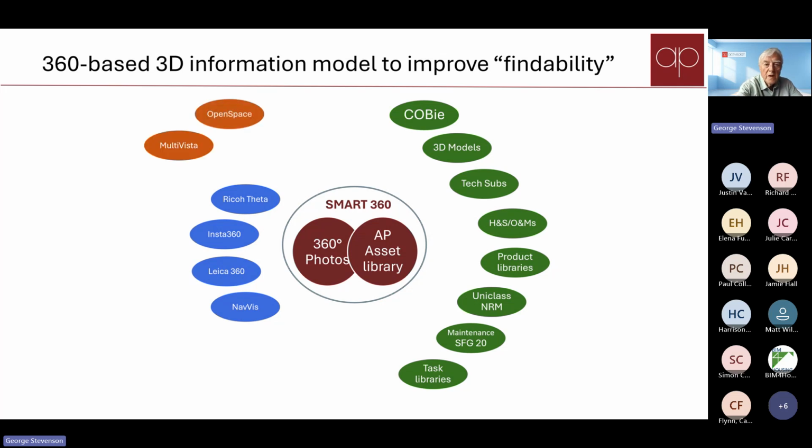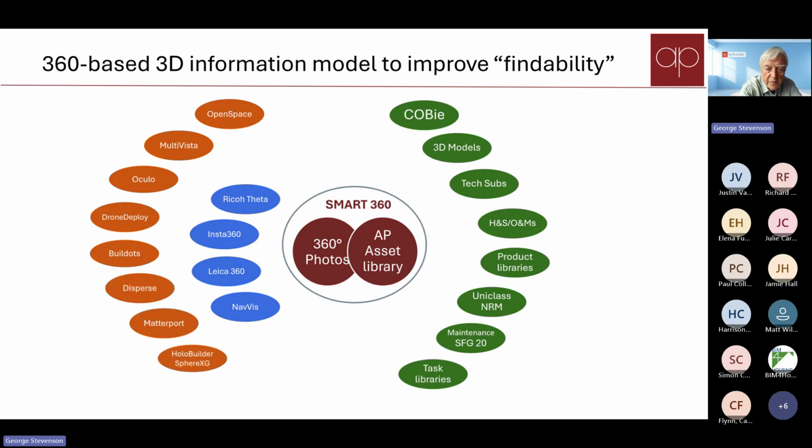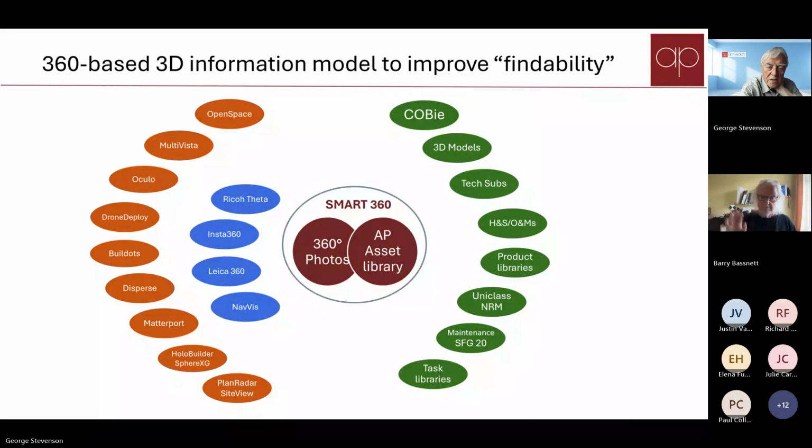There's also a wide range of applications that have been built up increasingly during construction. These applications are largely taking 360 photos, and the purpose of those is really quality management, reducing risk of claims, also managing claims against subcontractors. I imagine the main contractors would be doing.